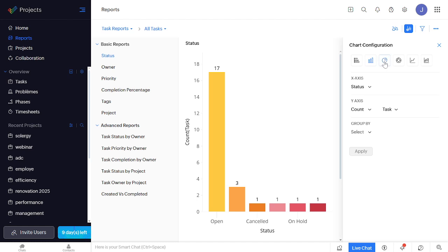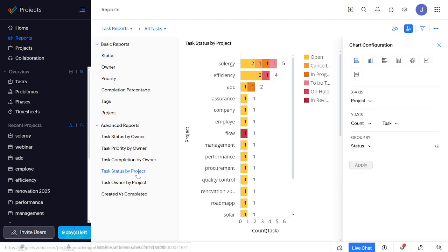Now, let's drill down to the specifics. You'll need to select the planned versus actual in the report type dropdown. This lets us compare our intended milestones with our actual progress. It's like having a mirror that reflects the reality of our project status.